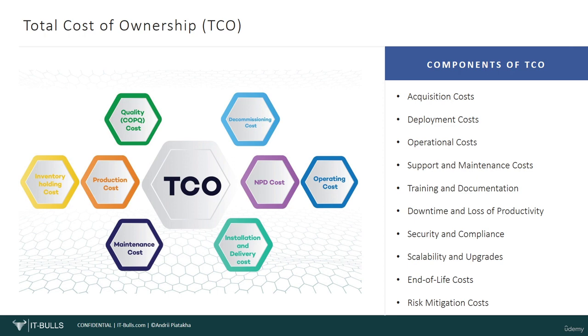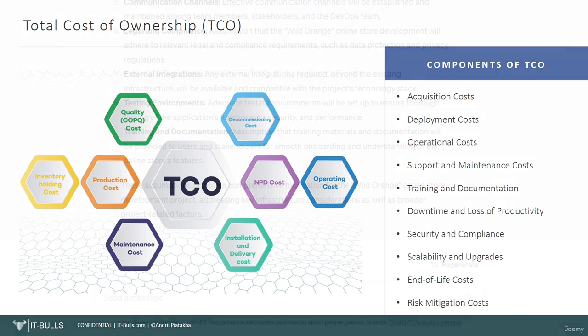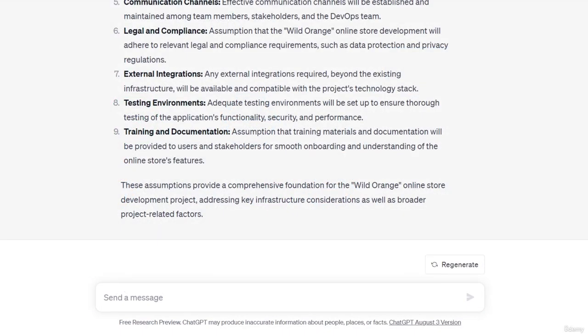So, we flagged this question, we received an answer. As a project manager, I will not be worrying about this too much, but I will capture this as an assumption in order for us to be on the same page regarding our agreements. Let's just keep it crystal clear, starting from the very beginning. The total cost of ownership is not a part of the budget estimation based on today, and is the responsibility of Wild Orange. And also, let's generate a few more risks related to existing dependencies.